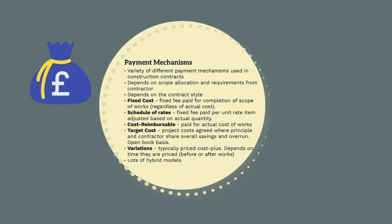Finally, variations — also known as changes to scope — are typically priced at cost-plus. Contracts will typically specify a profit margin for variations, say 8%, and the contractor will be paid the actual cost plus an 8% margin. The contractor will typically have to provide invoices, day sheets, and labour records to justify these costs. Lots of hybrid payment models also exist; for example, a contract might have a lump sum component, schedule of rates component, and cost-reimbursable component, reflecting the scope and risk allocation with the contractor.